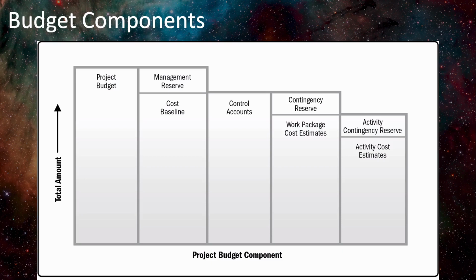In other words, looking at this from the other point of view, the cost of the project is organized into control accounts, and all of the costs belong to a control account. There aren't any costs that aren't accounted for in a control account.